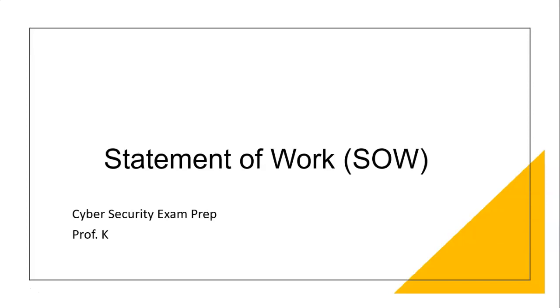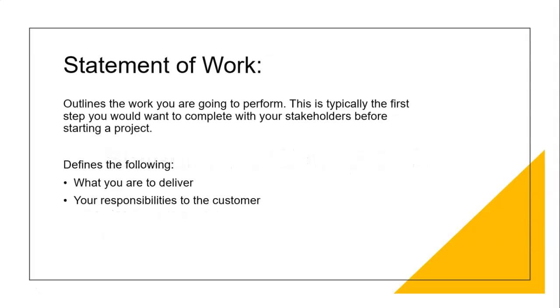The statement of work is going to be the last document you and the client agree upon and sign off on before work starts. Again, the statement of work outlines the work you are going to perform. This is typically the first step you would want to complete with your stakeholders before starting a project. It defines the following: what you are to deliver and your responsibilities to the customer.